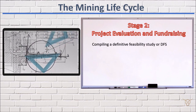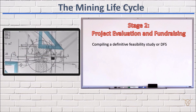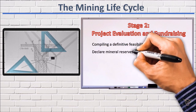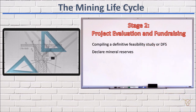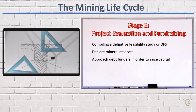The DFS would build on the information in the pre-feasibility study and would entail additional drilling and sampling, more detailed mine planning and design, and additional financial modelling. The DFS would provide management with increased confidence on the ore body and would allow them to declare mineral reserves. Once the reserves and the DFS were completed, the sponsors would approach debt funders in order to raise enough capital to construct the mine. Typically, debt funders would only invest in mining projects at this stage or at more advanced stages, relying on the detailed information contained in the DFS.